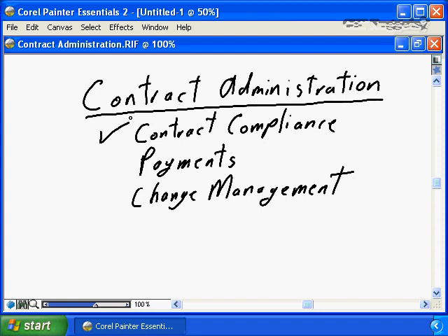How could they get away with terminating the contract with cause, when in fact we were adhering to the statement of work, and the scope, the deliverables, everything was according to specification? They found another clause in the contract that we were in violation of. It was a very simple contract clause that basically stated the seller, that was me, was responsible for delivering a detailed status report to the buyer every Tuesday at noon. Well, through personal relationship, we had changed that, and I was no longer delivering weekly status reports by Tuesday at noon. I was delivering bi-weekly status reports every Friday.